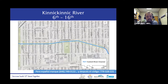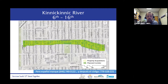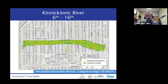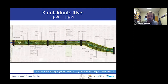This is the river channel and we need additional conveyance — additional space to move water through this area. We have to acquire the homes along this section. We've acquired 79 out of 83 homes, and we need to acquire and remove the last remaining four, which will take place over the next couple of years. Starting next year, we will move into the final design, working towards getting community feedback and finishing up the final design to define what this naturalized, expanded channel looks like through this section, as well as replacing the several different bridges that are part of this project.